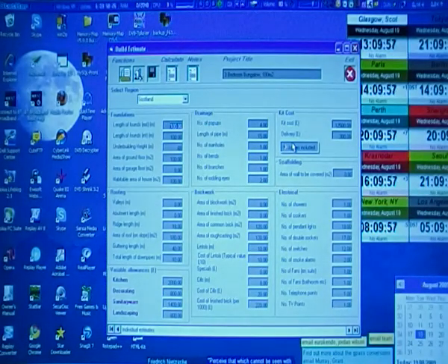The costs of a self-build are broken down into generic areas, things like foundations, roofing, drainage, brickwork, etc. These costs, known as the material costs, are readily available, the labour rates are readily available, and the formulas used to multiply out to get the final cost are fairly straightforward. What we've done in this package is put this together behind a very easy one-click button. The individual areas you should be able to derive fairly easily from the plan, but we've also added a few standard type builds in. See, there are a 3-bedroom bungalow, 4-bedroom bungalow, 2-storey, 4-bedroom, 140 per square metre, etc.